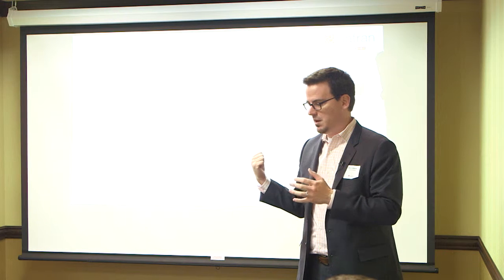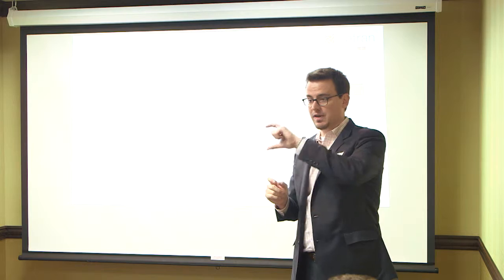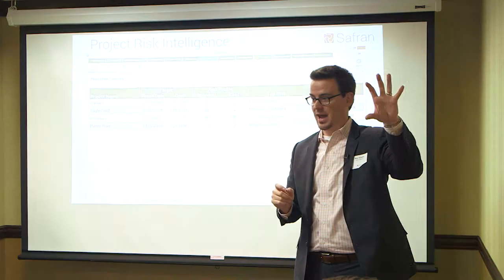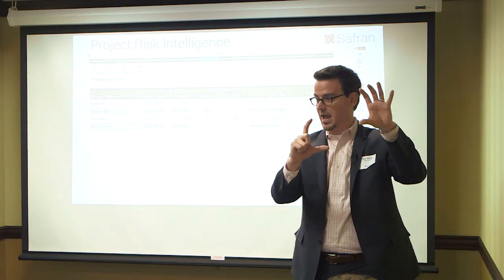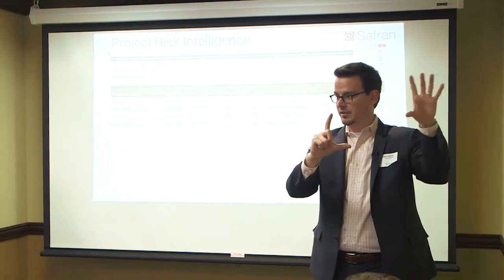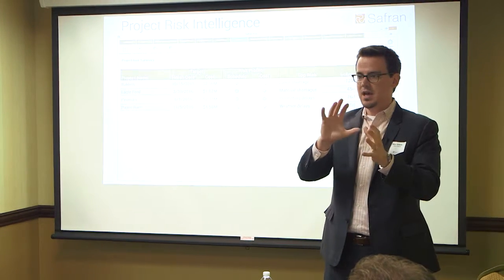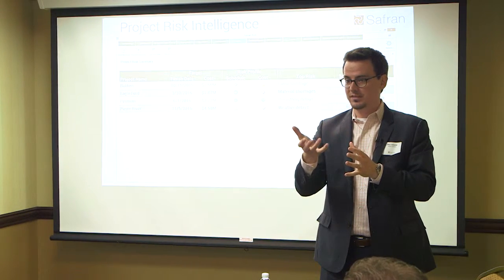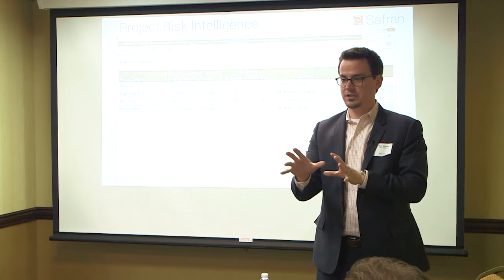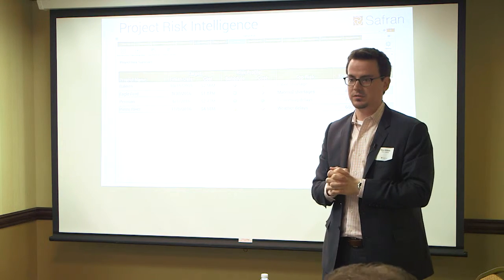We were with Aerospace and Defense yesterday in DC. They do a lot in terms of plotting out their earned value forecasts versus their risk forecasts. If those two intersect, we're okay. But if they've got an earned value forecast outside of the risk forecast, they're like, there's no way it can happen. So the thoughts on how to use that football plot and the scatter plot have changed over time, which is refreshing. We're going to bring it forward and see if we can drive some further insight as well.